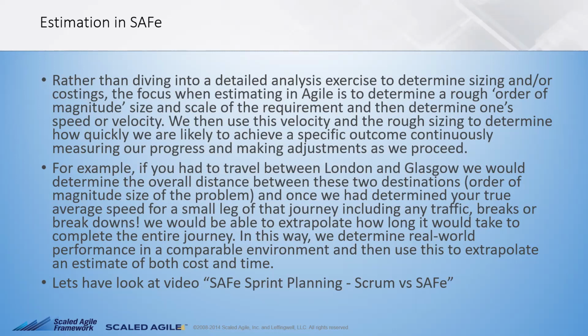Rather than diving into a detailed analysis exercise to determine the sizing or the costings, the focus when estimating in Agile is to determine the rough order of magnitude in terms of how many user stories, how many requirements you can churn to completion in a given time. And that's what we normally refer to as velocity. Agile is to determine a rough order of magnitude, size and scale of the requirement, and then determine one's speed or velocity.